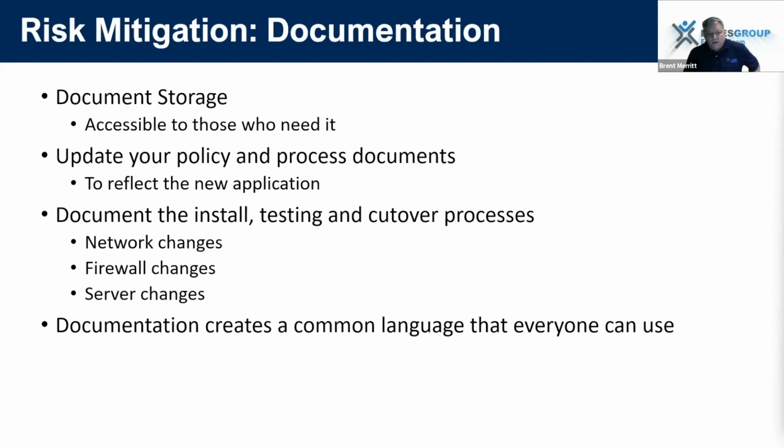You document the install, you document the testing, cutover process. When we as Estes set out a project, we have different phases, and within those phases we'll have different pieces. Those different pieces, if they don't go in that specific order, then things tend to get moved around, and you've got to be able to document all of that as you go, such as network changes, firewall changes, server changes, system changes, DNS changes.